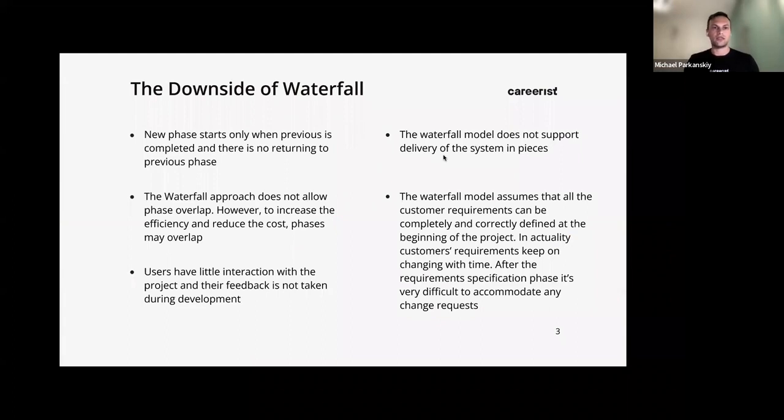The waterfall approach does not allow phase overlap. However, to increase the efficiency and reduce the cost, the phases may overlap. Sometimes the development and the testing could overlap. You might be able to test some of the things that are being sent over to you in small increments, but it's not always the case. Users have little interaction with the project, and their feedback is not taken during development.